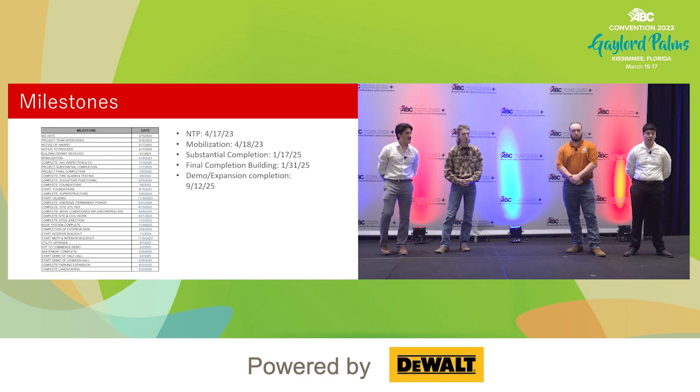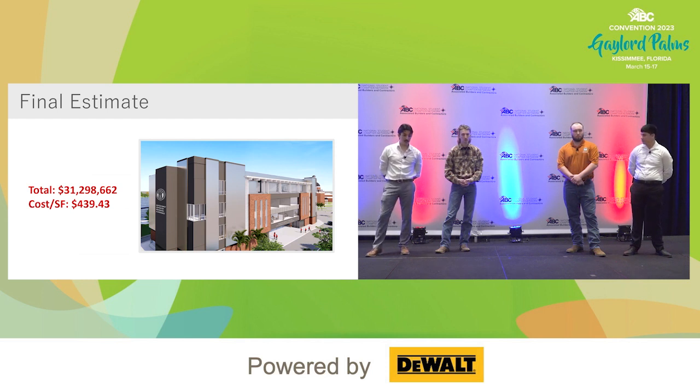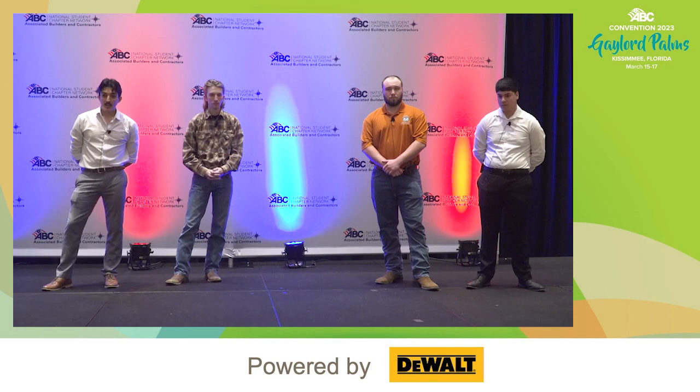Our total project duration for both the new build and the demo is 617 days. And our final estimate for your project is going to be $31,298,662, or roughly $439 per square foot. Do we have any questions?